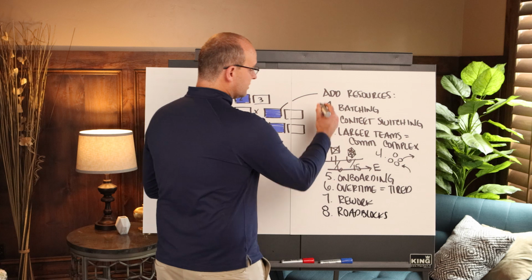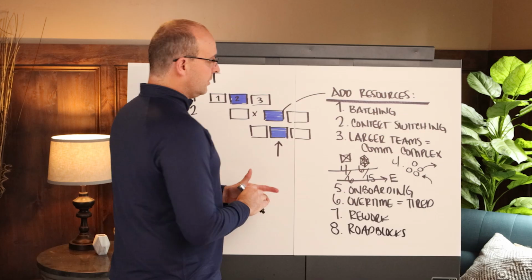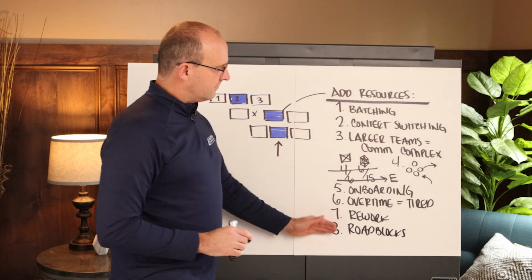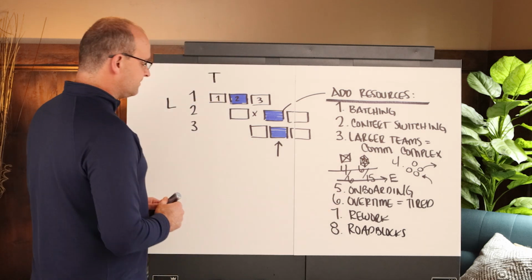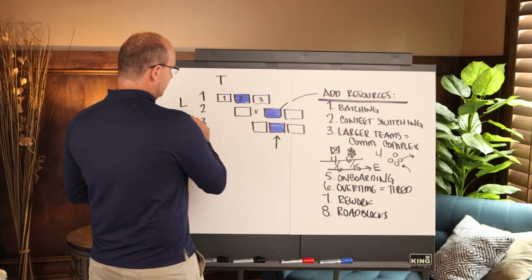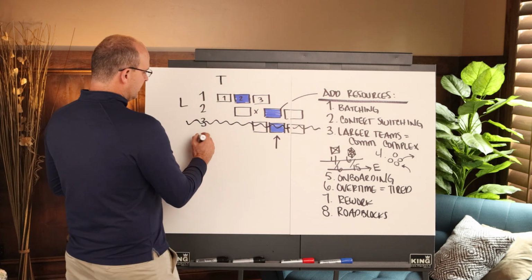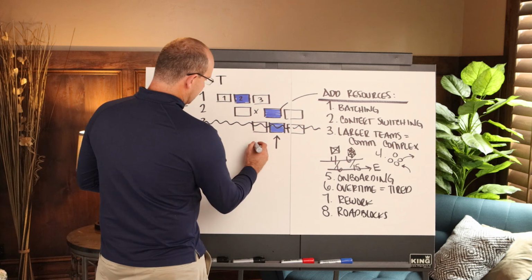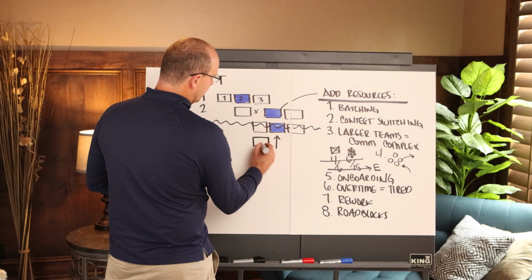So there's actually more to it, but the bottom line is when you do this and you add resources, you start to have all of these negative effects from a productivity standpoint. And so what we should have done was literally, instead of holding this third zone like this, just cascaded that out. So I'm going to draw it the way that it should have happened.